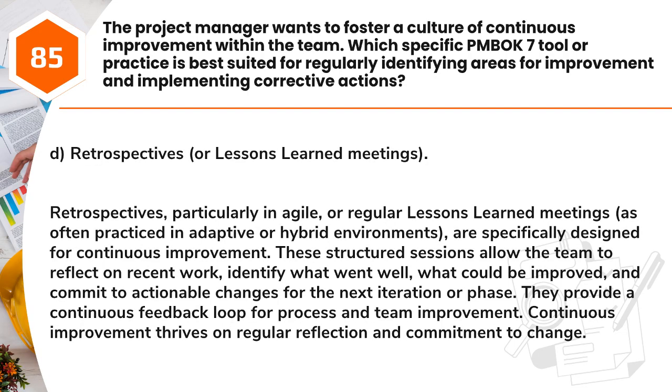Answer: D. Retrospectives or Lessons Learned Meetings. Retrospectives, particularly in agile, or regular lessons learned meetings, as often practiced in adaptive or hybrid environments, are specifically designed for continuous improvement. These structured sessions allow the team to reflect on recent work, identify what went well, what could be improved, and commit to actionable changes for the next iteration or phase. They provide a continuous feedback loop for process and team improvement. Continuous improvement thrives on regular reflection and commitment to change.